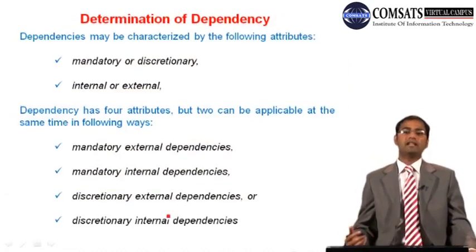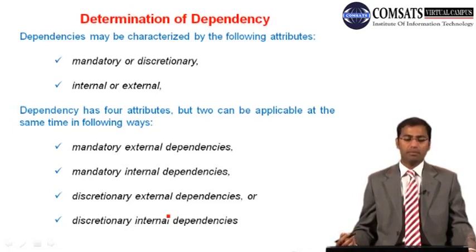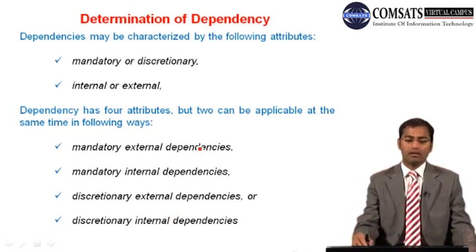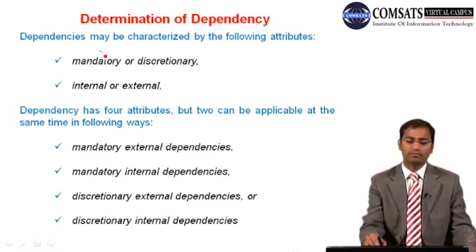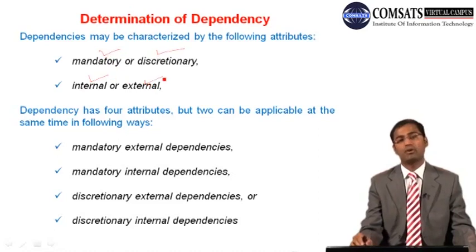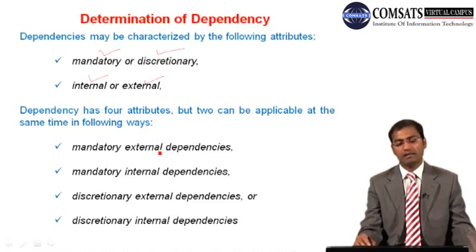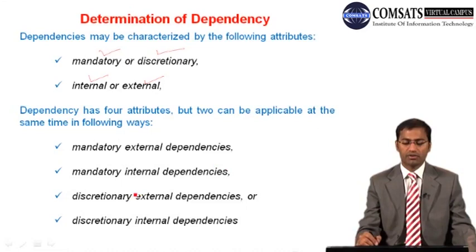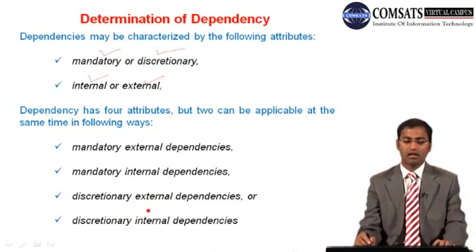Dependencies may be characterized by four attributes: mandatory or discretionary, and internal or external. These combine into four types: mandatory external, mandatory internal, discretionary external, and discretionary internal. Mandatory dependencies are legally or contractually required or inherent in the nature of the work — for example, it is impossible to erect a superstructure until the foundation is built, or a prototype must be built before it can be tested. Mandatory dependencies are also called hard logic or hard dependencies.